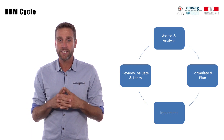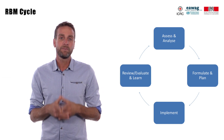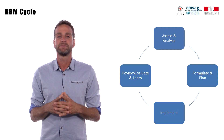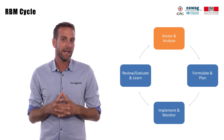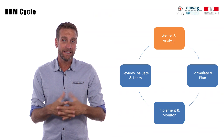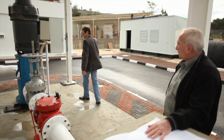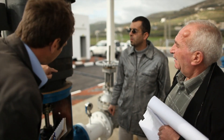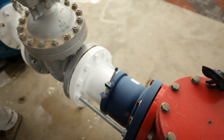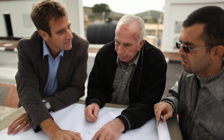In order to maximize the chances of achieving the desired outputs, outcomes, and impacts, the RBM recommends following four main steps presented in this cycle. The first step is the assessment and analysis. In this step, you collect qualitative and quantitative data through a field assessment, and analyze the data along with information gathered from stakeholder conversations to identify the highest priority urgent issues. The aim of an assessment is to understand the situation in order to identify the problems, the source of the problems, and the consequences of the problems.